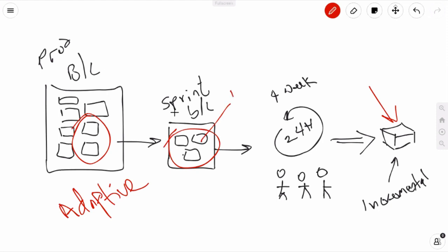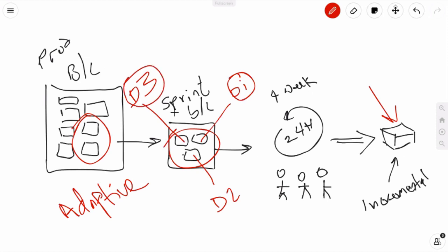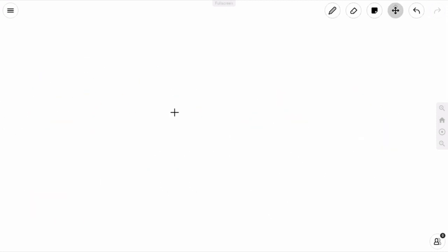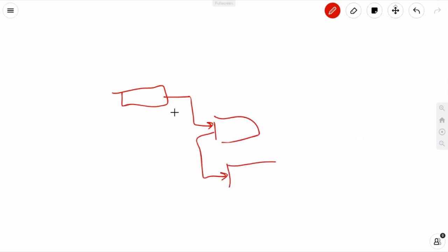You could have developer 1, developer 2, and developer 3 working on pieces that have few interconnections. So what I'm doing here may have little or no bearing with this. It may have some interconnections with other pieces, but it's not like your traditional schedule where I have to get this done and then I do this, or this is dependent on the finish of this, you know what I'm saying?